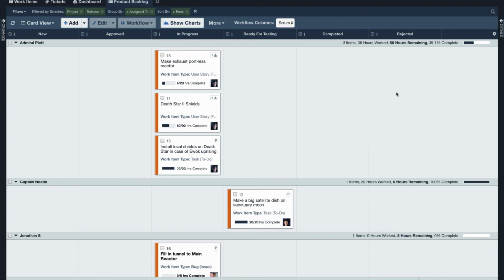Yeah, and this is great, right? This now gets to more of that visualization that we just talked about. What you're seeing here, and part of what Jonathan's doing, is I assign work to myself. Someone does not assign work to me because we are a team. We're working as a team. Now we may have a discussion as to who may do what, but at the end of the day, I'm pulling things from the backlog that I'm going to work on.